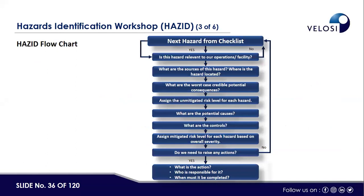This flow chart explains the HAZID workshop process for hazard identification. First, we determine if the hazard is relevant to the project or facility. If so, we identify the sources and location of the hazard, then identify the worst-case credible potential consequences, and assign an unmitigated risk level to each hazard. We then identify potential causes and control measures, and assign a mitigated risk level based on overall severity.